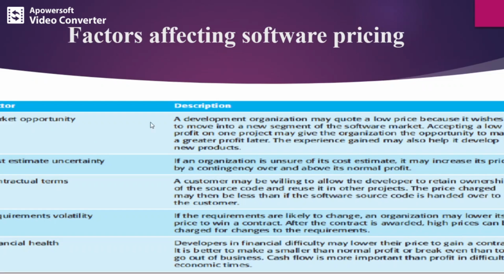No, a development organization may quote a low price because it wishes to move into a new segment. Because you are a new organization, you want to make a name, so that's why you can quote a low price. Accepting a low price means a low profit. Now the profit is low on one project. What does that affect? It might affect your company, but that's the first project, you think. Then what happens? It may give the organization the opportunity to make a greater profit later.